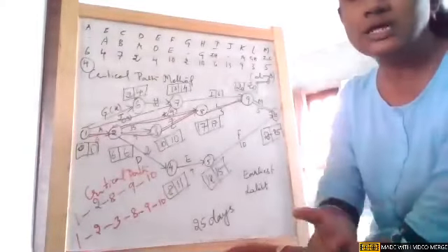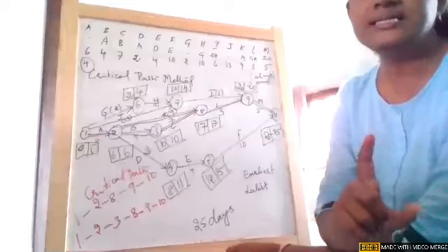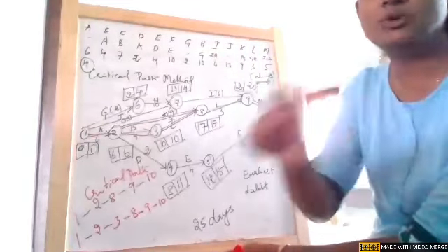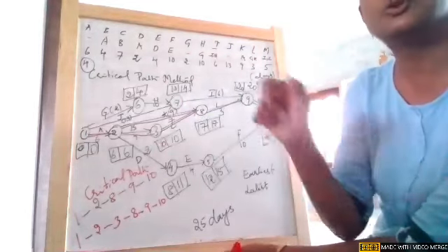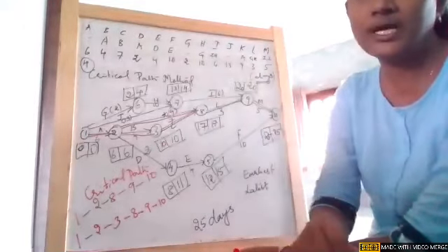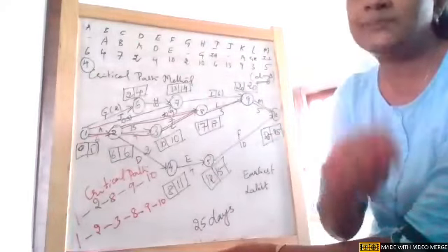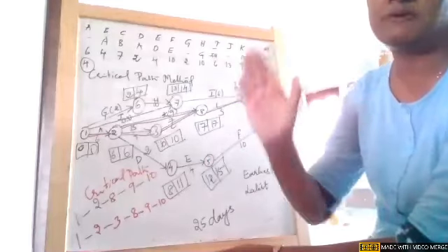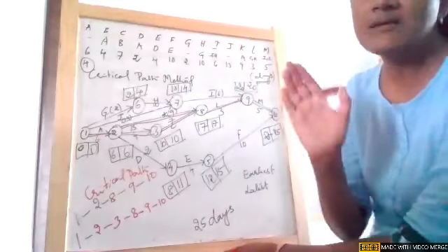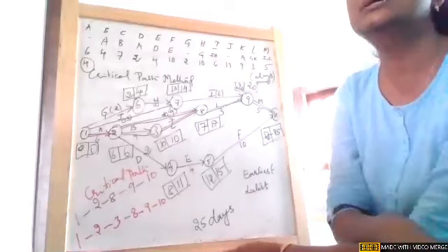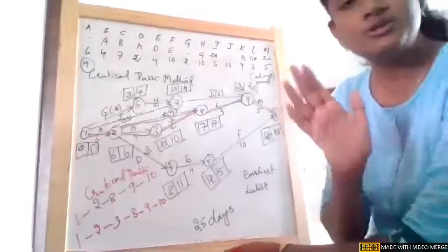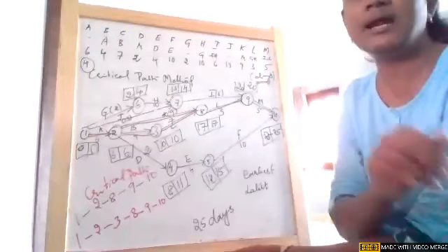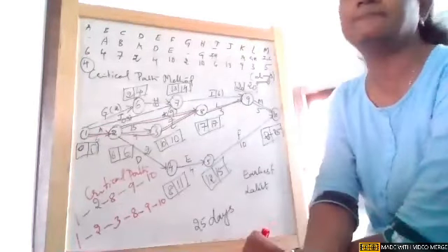If near the node there is only one arrowhead, just add the earliest time of the previous node with the duration on the activity, like 0 plus 2, and give the time as earliest. And if there are multiple arrowheads, give the maximum duration. When I am going reverse from finish to start, obviously the reverse, subtract the durations if there is a single tail. If there are multiple tails, follow the same rule of subtracting, but pick the minimum duration and write it near the latest time.